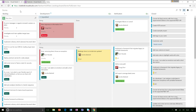That's very much a pull model, which is different from other past models which have been very much push. And as soon as you drag something into development, you'll notice something about the development column that's a little bit different — it's been split into two sub-columns: doing and done.